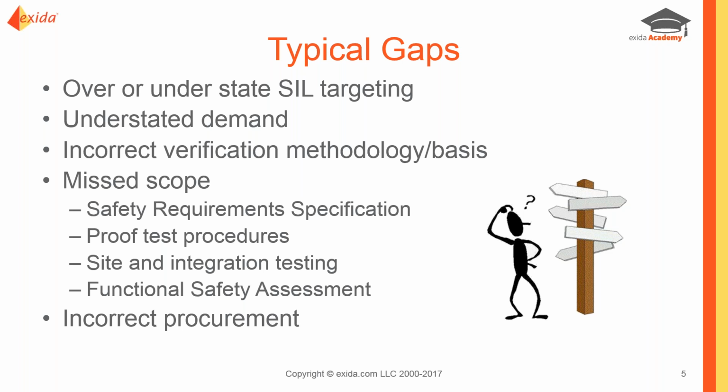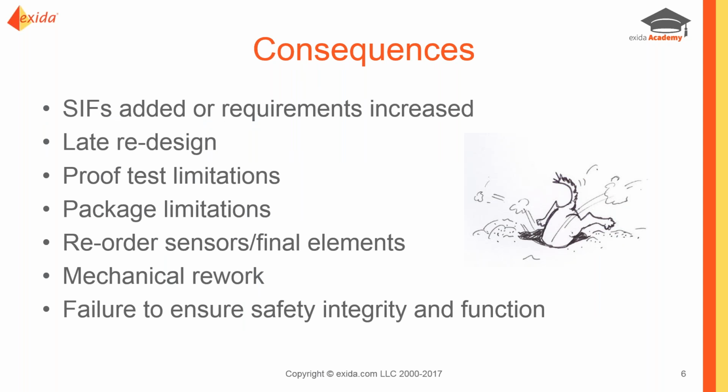And of course, if that happens at the last minute, there can be issues with installation in the field and additional rework required. So the consequence of these gaps, obviously, last minute redesign, mechanical rework, safety functions may need to be added to the system that were not intended to be there initially, or the requirements of safety functions may be escalated, and all of that takes some effort to correct last minute.